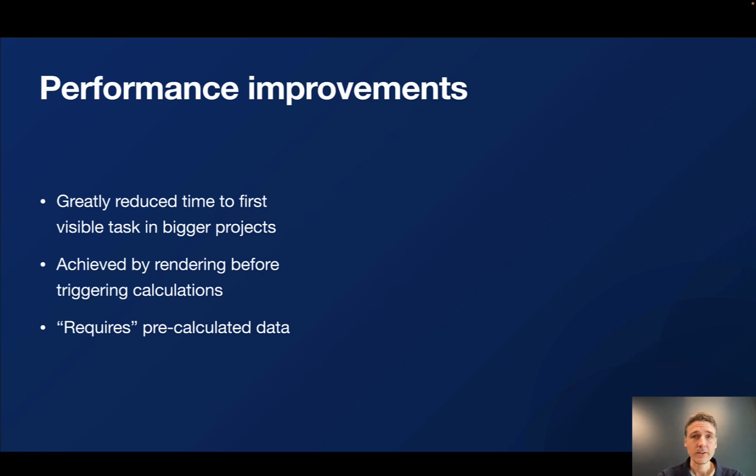When data is loaded, the graph is constructed and all the tasks or events are calculated. That includes taking calendars, dependencies, assignments, constraints into account, correcting and normalizing dates and durations, and so on. And for a large dataset, this can take some time.